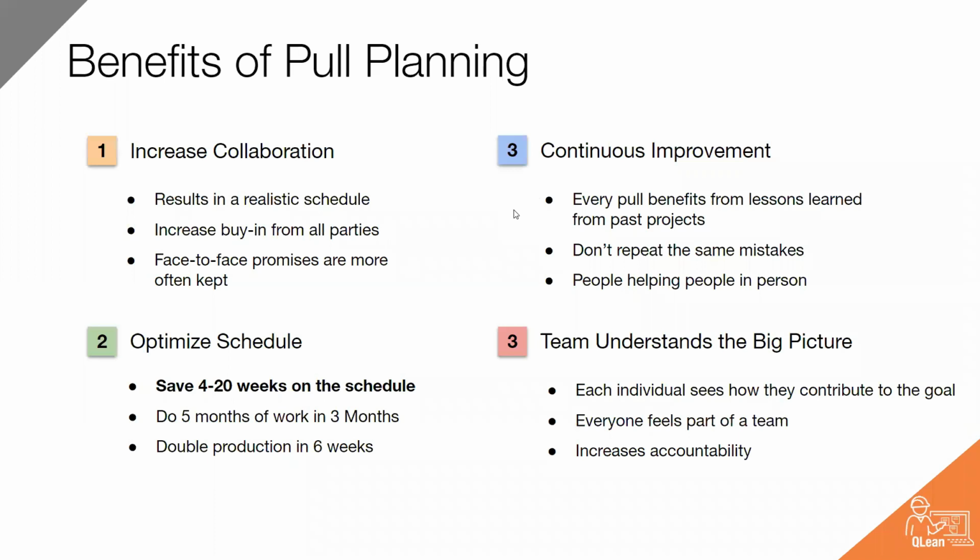Great. So what are the benefits of pull planning? It's probably more for those that might not have pull planned, and reminds the rest of us why we do it. But it really increases collaboration. It creates a realistic schedule that we can look each other in the eye and say, hey, I agree to this, you need that. There's some psychology around people actually adhering to verbal commitments better than written, believe it or not. It seems kind of backwards, but if we're all in the same room and can understand each other, then we all know what we're up against.